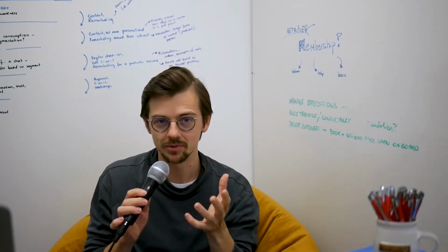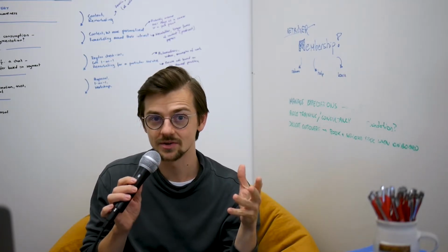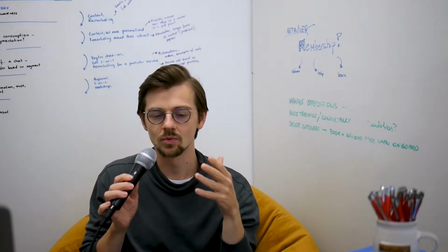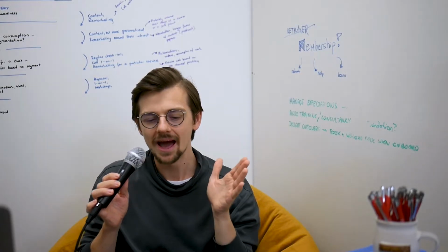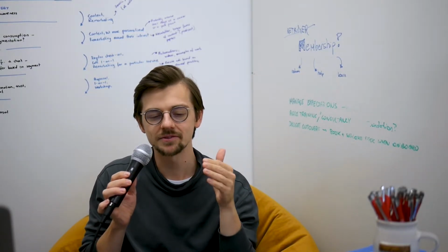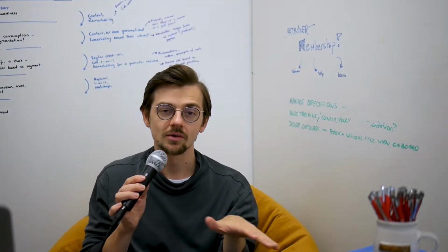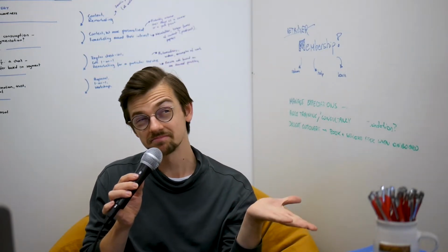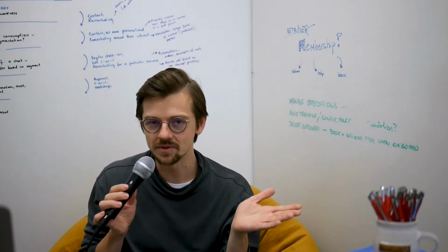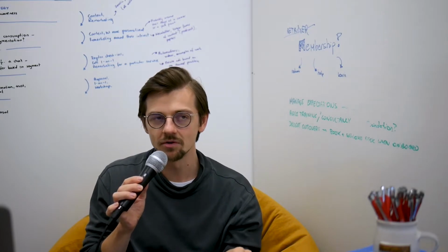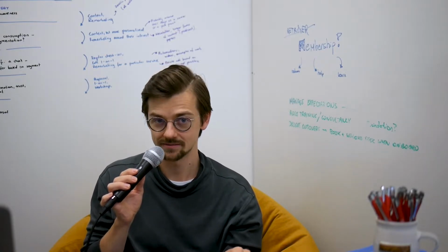You need to talk to people all the time to make sure that everybody is on track, they prioritize their work properly, and they all work towards the same goal. Now, if a project takes just a few weeks, you have to shorten the feedback loop. You have to keep meeting more frequently. In a proper software engineering scenario, you might be meeting every 2 weeks, but most likely every month. It depends on the scope of the project, I guess, or the number of people involved, but the frequency of meetings is probably between 2 to 4 weeks, somewhere in there.